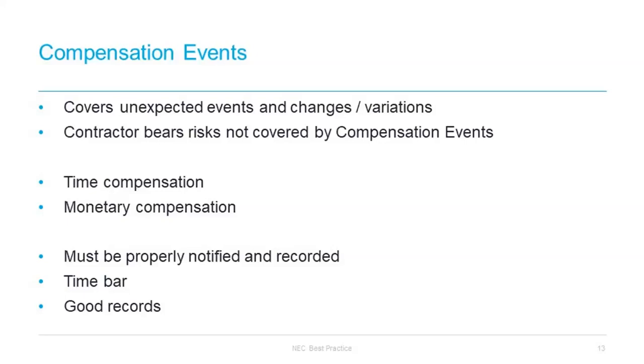Recovery for equipment in a compensation event is usually calculated by reference to a predetermined published list of equipment rates, again as set out in the contract data. And it only includes the labour cost if that published rate also includes such a cost. An example might be a tower crane, as the published rate for tower cranes would normally include a licensed operator and so would be an all-in rate.